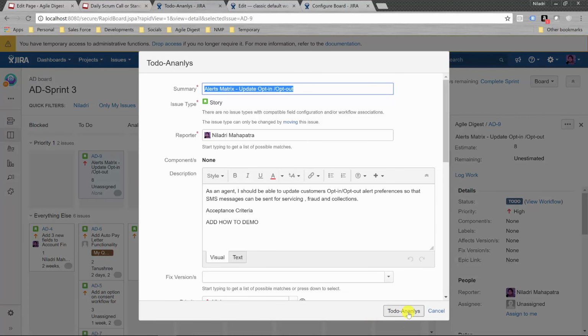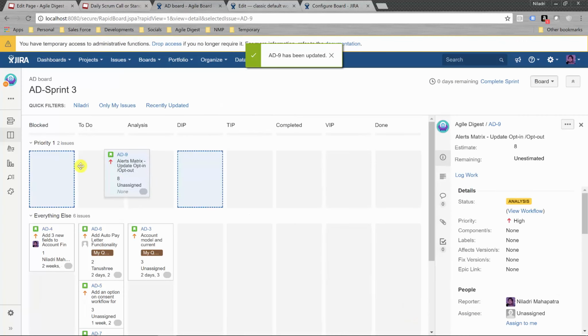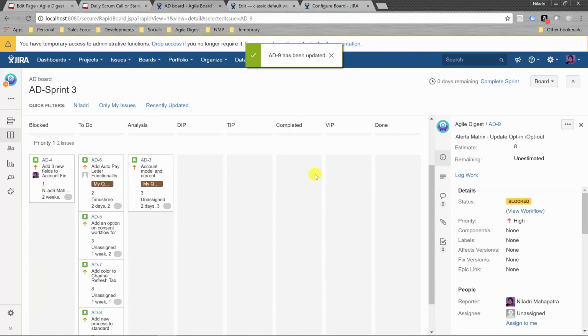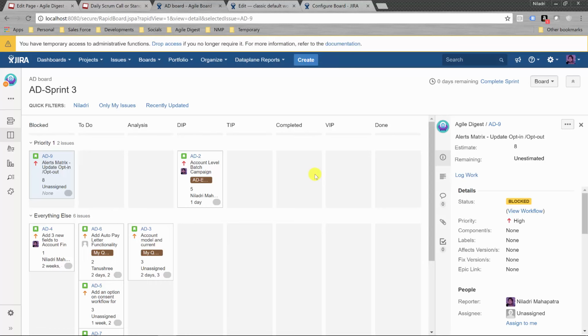there was a transition screen I had. So by saying okay, To Do to analysis, and from now you can actually move it to blocked, and in this way you can actually see how many stories are blocked. By doing this way, at the time when the story is blocked, you are not able to identify at what state it was blocked. I don't suggest to follow this workflow, but I saw many practices they used to have a blocked state because they have some reporting and to have the streamline of the existing organizational standard, they used to work in this way.